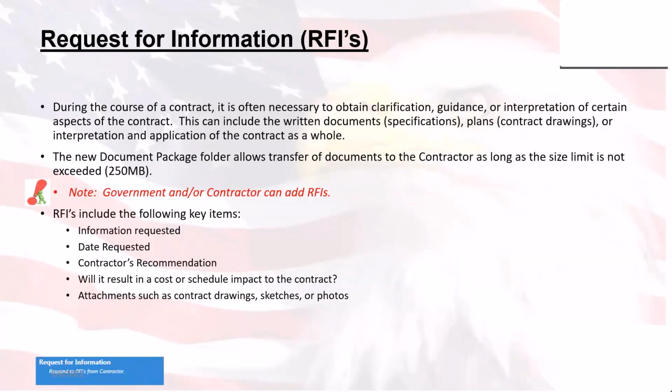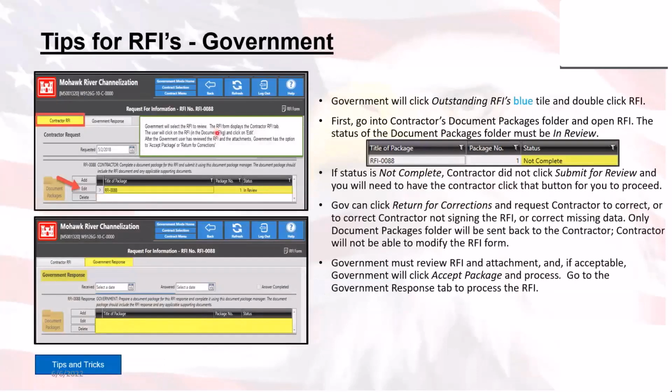And these are very important because if there's an audit later on, or a contractor has a complaint or a problem with the contract, a lot of times RFIs are the first place everyone goes to. The auditors will go to the RFIs and look: were the drawings there? Were the sketches there? Was it agreed upon? Was there back and forth communication? This is kind of the system of record. So it pays to put a lot of effort and time into this early on, so that later on, if there is a problem, which you hope that there isn't, but you plan that there is, you can come back here and deal with that.